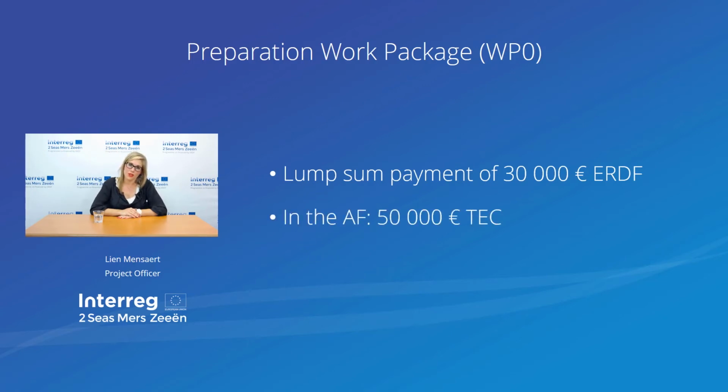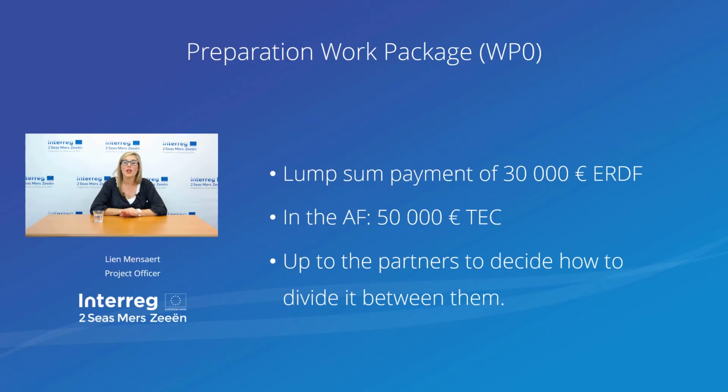With the intervention rate of 60% ERDF for all of our projects, you will have to ask for 50,000 total budget in order to get the 30,000 ERDF. So please do not forget to put in 50,000 instead of the 30,000 that you will get in ERDF.